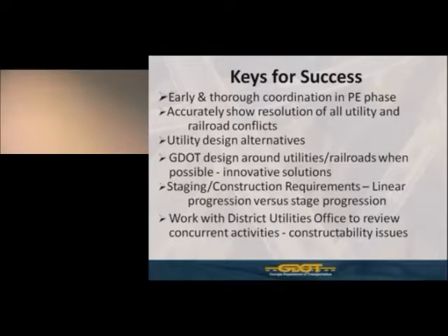the milestones for our plans are essentially once a preliminary field plan review is held, which may be a year to 2 years out from a letting, that is essentially the milestone to get approved right-of-way plans, and then the department starts right-of-way acquisition for a project. And then, as I mentioned earlier, a final field plan review will be held approximately 6 months prior to the letting of a project. So, and that's when final design is completed for our roadway plans. So those milestones are critical in order for us to do some redesign for our project. As we get closer to a letting, it gets more and more difficult for us to accomplish any of that. So keep that in mind.